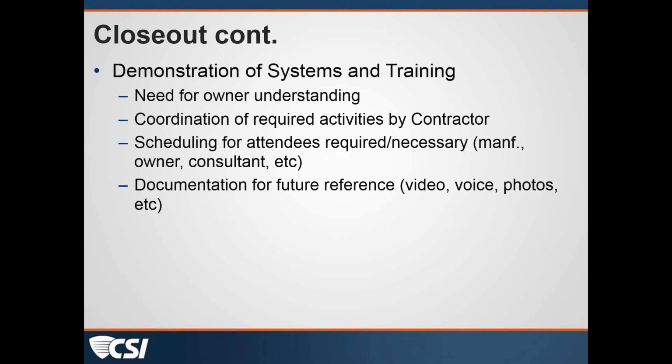All right. Well, we had a couple of comments that led into a question, I think, the way I'm reading them here. So the first comment came from Drusilla, saying we get contractor CAD'd drawings as closeout for fire alarm projects, which are actually their shop drawings and don't show the other electrical information. We require them to mark up the design documents.